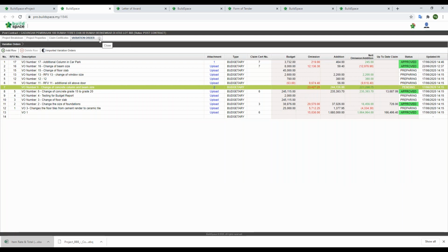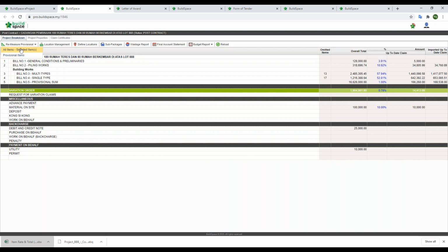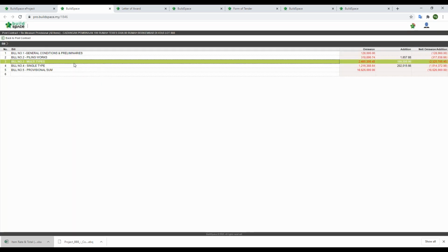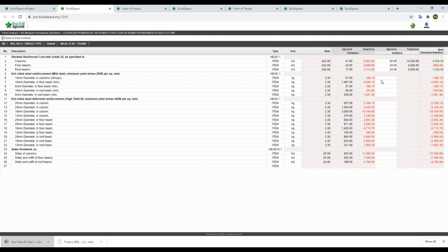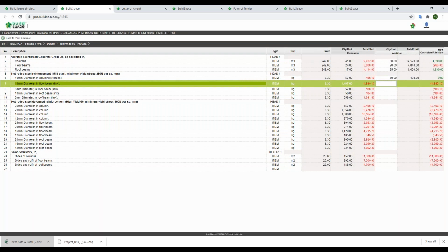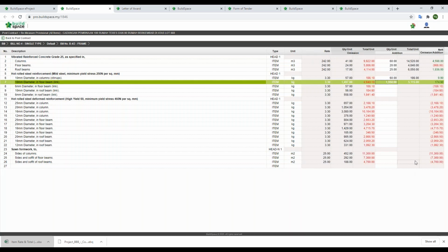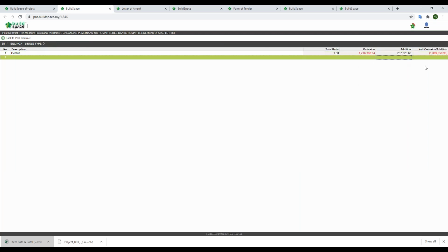And as the main contractor, if we want to do the remeasurement for our contract as well, we can go to the system. Let's say under our main contract or our BQ, we can actually go into the item level, let's say for frame. Starting from here, we can start to remeasure and come up with a new quantity. Let's say after this, 60. A new quantity, and the system will auto calculate for you the net omission and addition after you come out with the remeasurement.